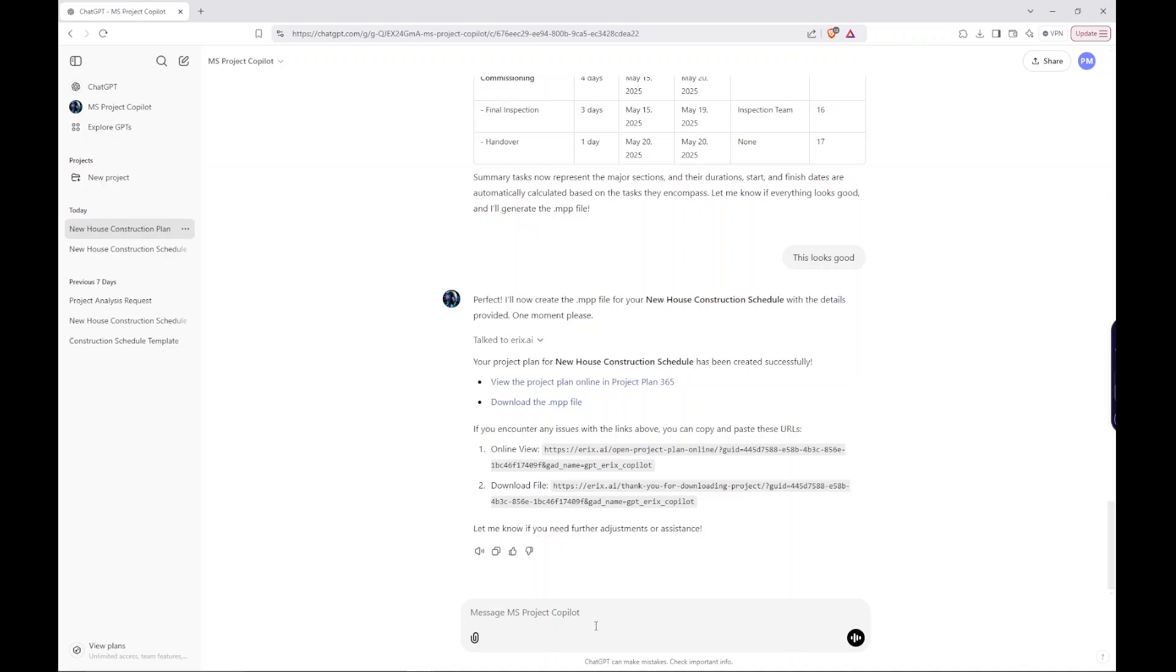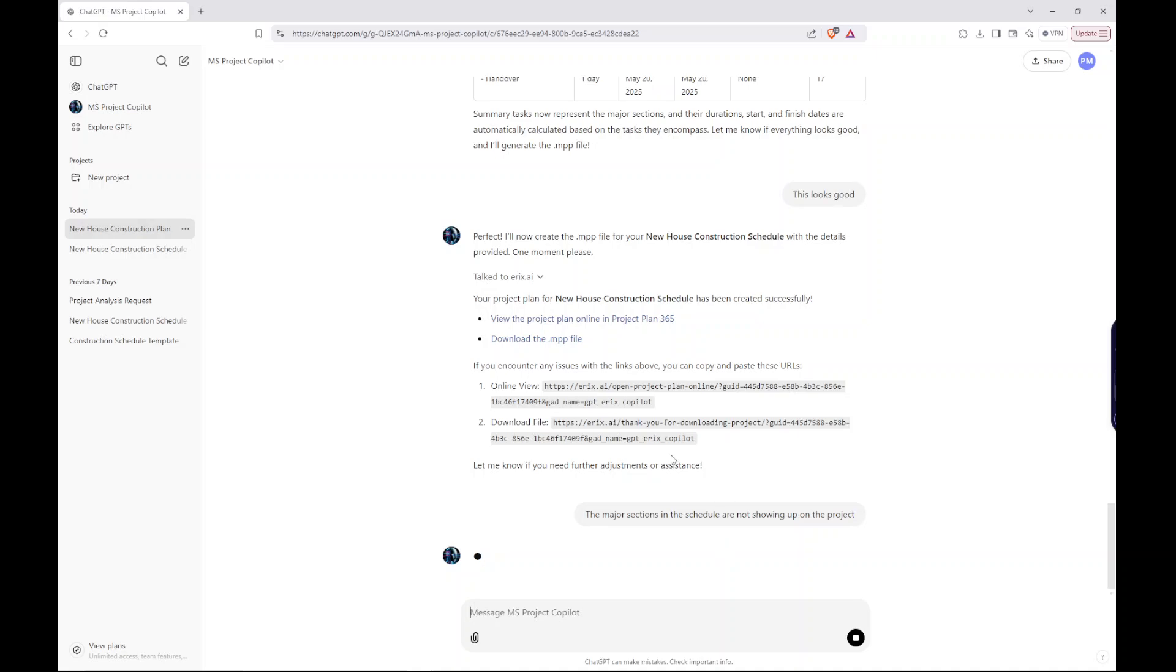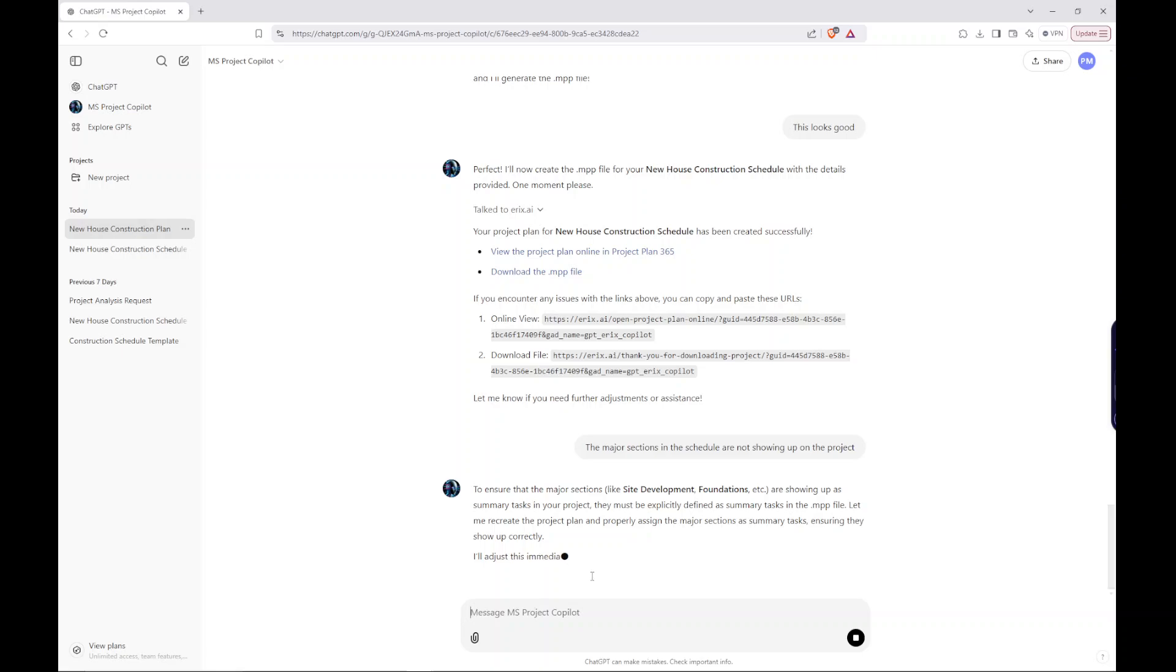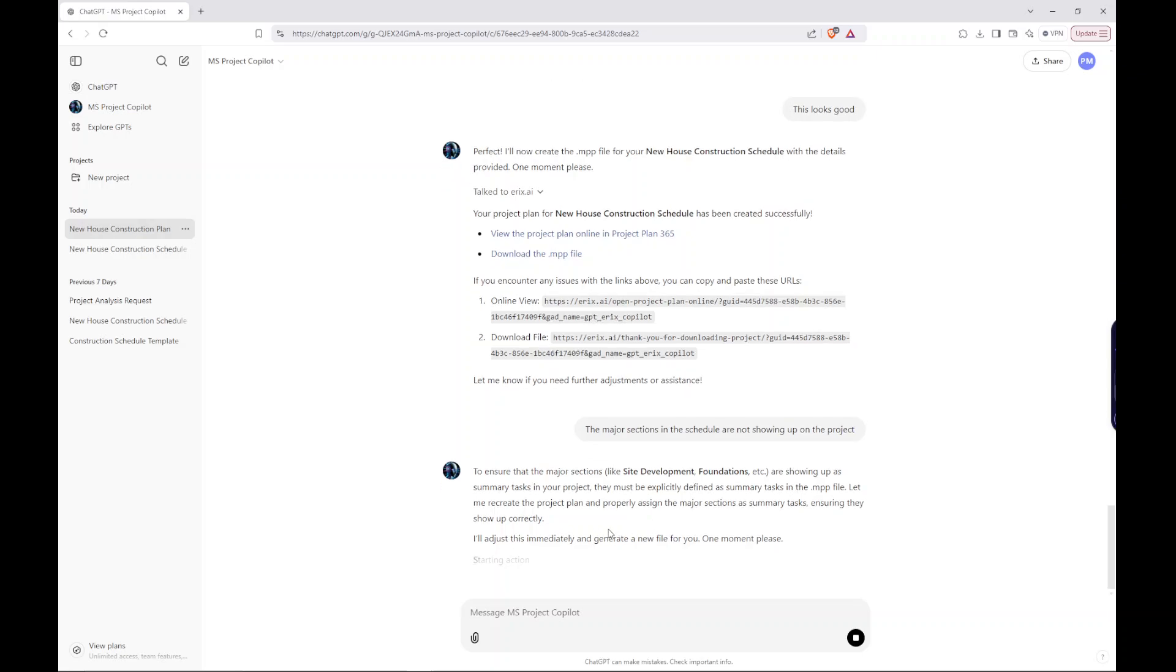The major sections in the schedule are not showing up on the project. To ensure that the major sections are showing up as summary tasks, they must be explicitly defined as summary tasks in the MPP file. Let me recreate the project plan and properly assign the major sections as summary tasks, ensuring they show up correctly. I'll adjust this immediately and generate a new file for you. One moment, please. So now it's going to generate that new file and let's see if it makes that correction.